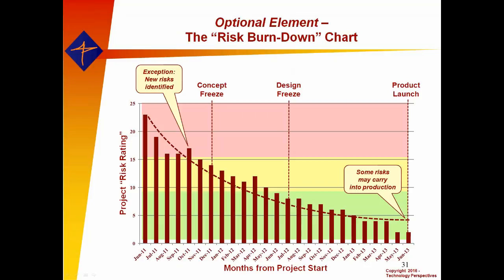So I use Microsoft Project or Primavera or Liquid Planner, tool of your choice. As long as it does automated critical path identification, that's a tool you can use. And I use it continuously because any change, especially if you have multiple parallel paths, any change to any duration along those parallel paths could cause the critical path to shift. And we want to be really mindful of where that is. So I hate to say it, but that's probably the one thing you really need an automated tool to tell you, where's the critical path, and even to the extent of inserting a little slack time on the critical path to find out what are called the shadow paths, those things that are just behind it that'll bite you if you don't pay attention to them.